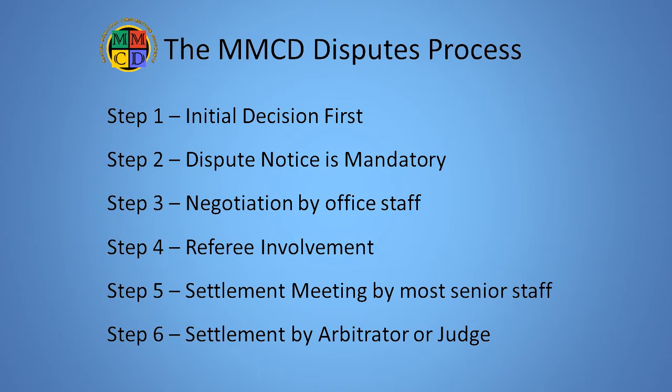Step 5. Failure to accept the referee's opinion leads to the requirement for a settlement meeting involving the most senior staff from both sides and we also recommend involving a mediator to assist. Step 6. If all else fails, the matter will be decided by a judge or an arbitrator.